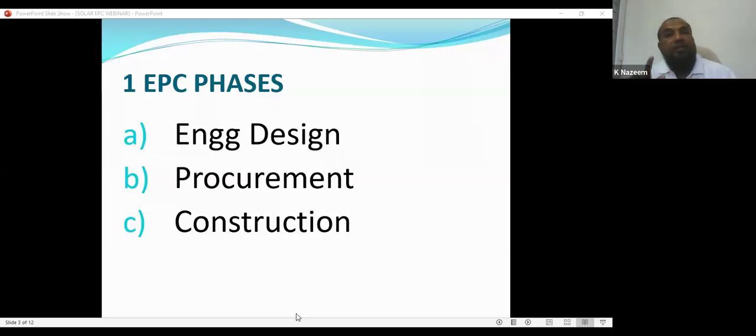Sometimes there is a hidden loss in the procurement process. If there are, say, 3 quotations, L1, L2, L3, you need not always go with L1. Sometimes it is a prudent decision to go with L2 because his supply chain management is very strong. He is prompt in supply, he is prompt in service. All these criteria, you have to go for L2, not the L1.